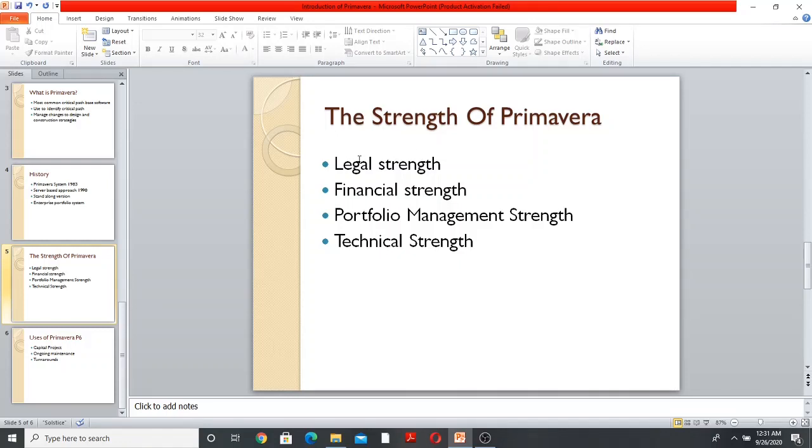Projects seldom go to plan, and when changes occur, there are often costly disputes that can end up being settled in court or by arbitration. Many contractors baseline and update their construction schedule as a way to gather backup evidence in case of dispute.